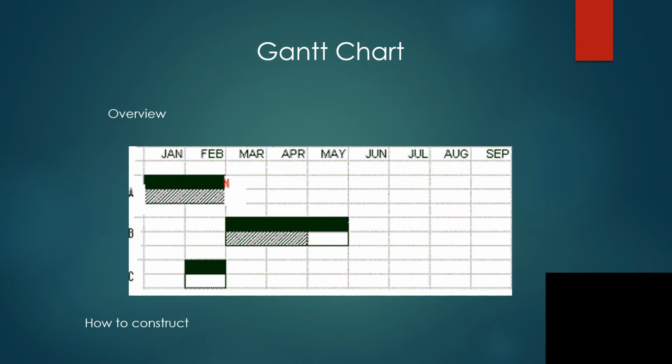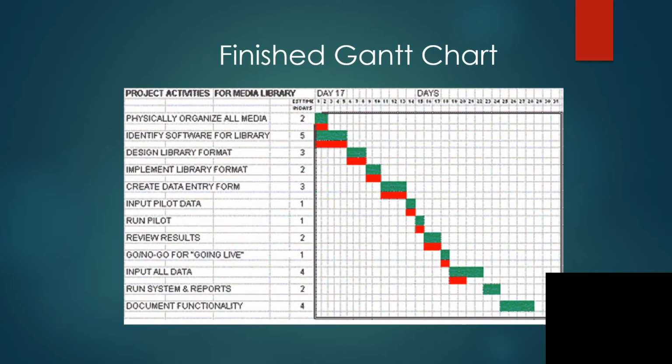Milestones are important because they are usually on your project's critical path. When you don't meet milestone dates, your entire project schedule suffers. Let's spend a bit of time discussing how to construct a Gantt chart. To get started, make sure to use a WBS to identify all tasks. Please keep in mind that your WBS doesn't sequence tasks. This is a job for your schedule.